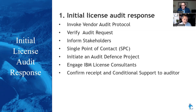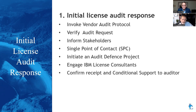Initial audit response: the letter arrives. Once the initial shock fades away and you take a deep breath, what happens next? We would say, if you have a vendor audit protocol, initiate it. Very often organizations are well used to getting audits from vendors, so they've established over time — maybe it's a checklist, maybe it's a detailed process. Find this out; the lessons learned from previous projects can be invaluable. Next, verify the audit request: where does it come from, what is the detail, have they given any clues as to the scope — maybe geographic, maybe products covered?